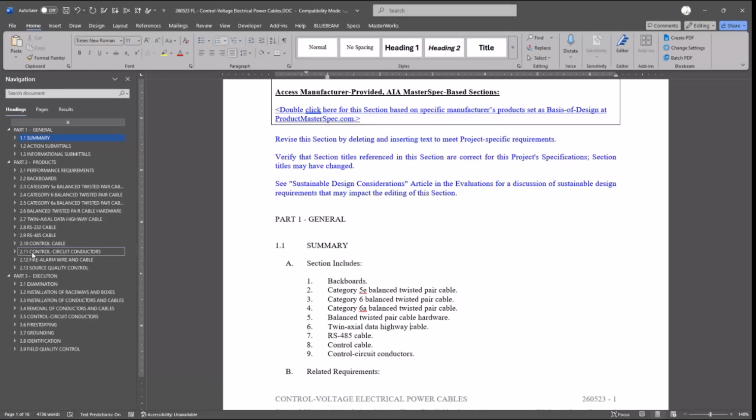Mostly that's a legal thing. Mostly it's an organization thing. But if you're getting it one way, you stick with whatever way you're getting it. And if you're getting it in multiple directions, you as an EOR should choose one direction to push it. So if the contractor is sending you emails and Newforma requests and whatever else, choose one.